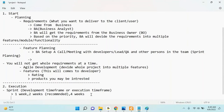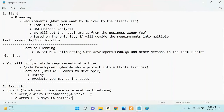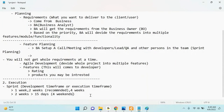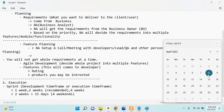10 working days, 8 hours per day. But in agile development you cannot work 8 hours purely on development. 8 hours is divided into productive hours. What are productive hours? The whole day you're not going to write code - there are calls, meetings, and other things. Whatever hours are left after meetings, that is called your productive hour. In our company, our productive hour is 6.5 hours per day.